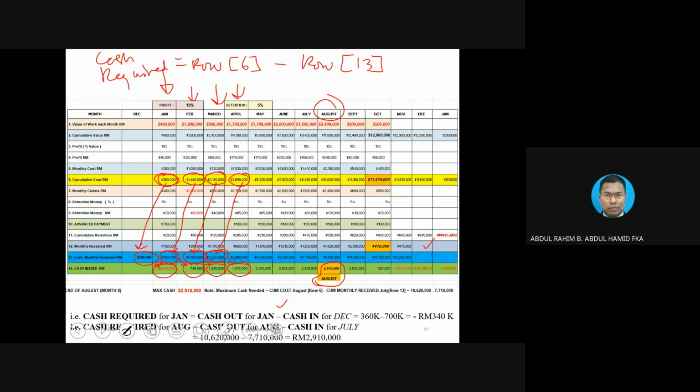And you notice that if you do the whole calculation, the accounting, the bookkeeping, you notice this amount, 1290 in negative. What is this amount all about? Actually, if you take value here, you minus with cost, this is what we call profit.